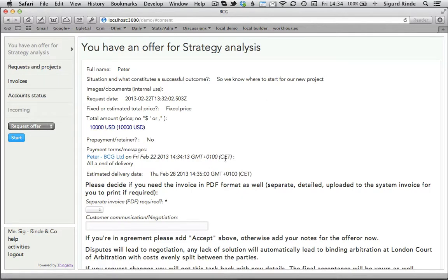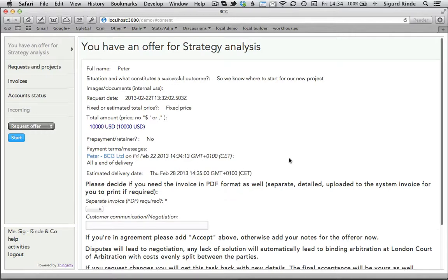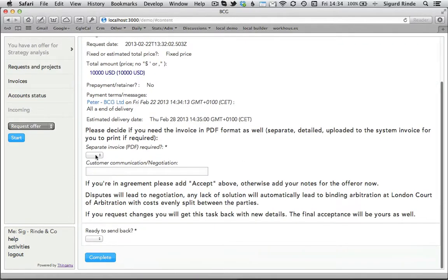And this is how these comments are added with the author and timestamp, which makes this negotiation round quite important, because it's the basis for dispute resolution later. There will be no I said, you said when everything is in here and it's timestamped by the system itself. There's no way anybody can change it. So that solves a lot of problems up front. Good fences make for good neighbors.